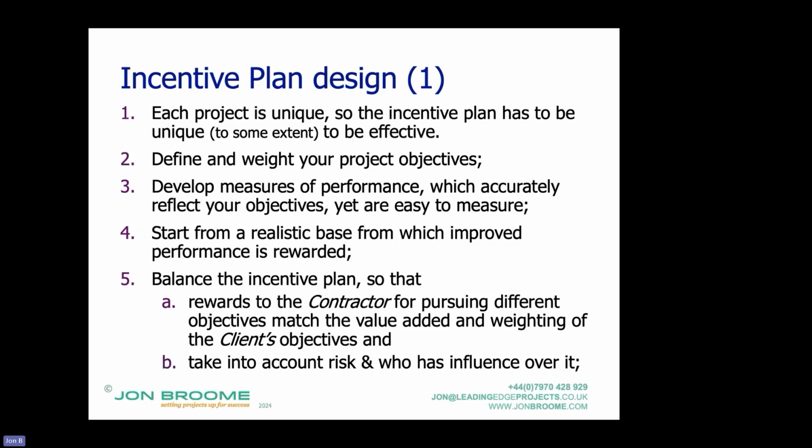So as a result, the contractor then pursues stakeholder management absolutely full on, to the exclusion of the other one, because it costs them more to do it than they get as an incentive. And meanwhile, the client is going, but I'm really incentivizing the first one really heavily, and you're doing nothing on it. So you need to balance that out. And you need to take into account risk and who has influence over it.